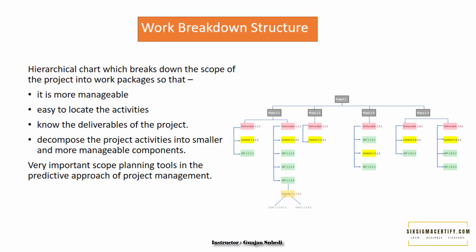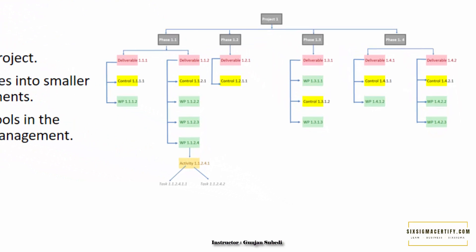The project is decomposed into smaller, manageable deliverables, work packages, activities, and tasks — this is the basic example of the work breakdown structure. The project is ultimately divided into deliverables, then into packages, then into activities and tasks. Notice how the work packages are assigned different numbers so we can trace them to get more information.